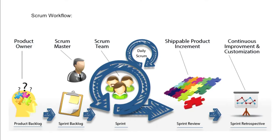This is yet another depiction of the same Scrum workflow. There is also a ceremony called the sprint review, wherein the team demonstrates the functionality they have developed to the end user, takes feedback, and works upon it in the next iteration. These intervals are called sprints in Scrum.